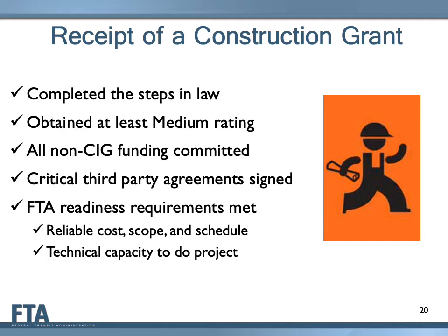Before FTA will sign a Small Starts construction grant agreement with a project sponsor, all of the non-CIG funding must be committed to the project, all critical third-party agreements must be signed, and FTA readiness requirements must be met. These include the project sponsor developing a firm and final project cost, scope, and schedule, and demonstrating the technical capacity to complete the project.